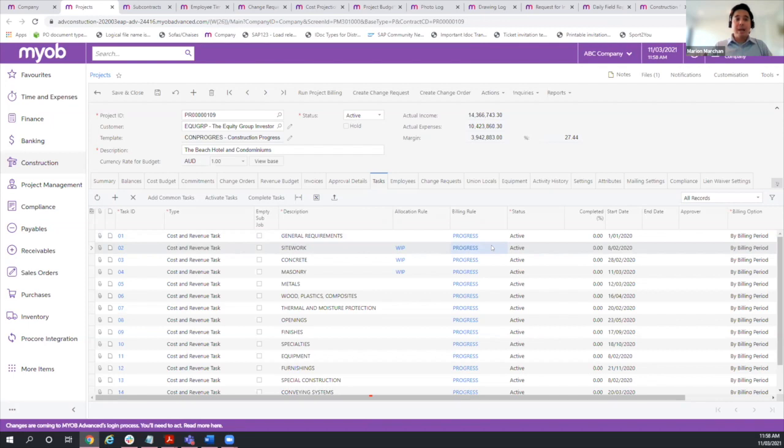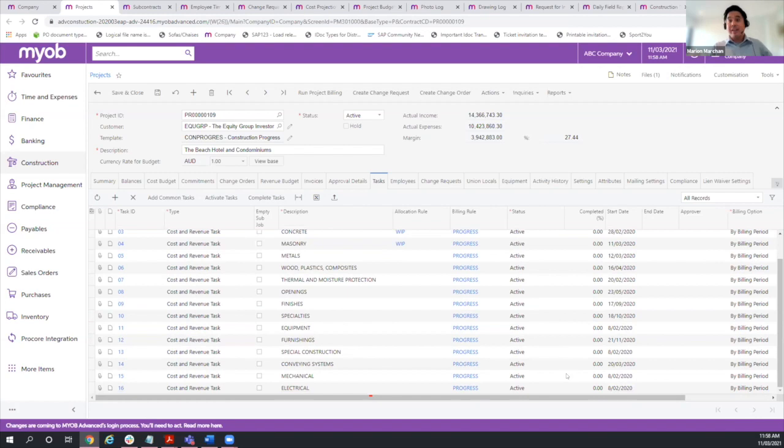One practical application of that is, I know usually when you're building a house, you have your progress billing while you're building the structure itself. But for the finishing, like the interiors and things like that, where customers have lots of choices in terms of how they want to finish the house, that usually becomes a cost plus engagement, where you charge a fixed fee on top of what the material costs are. So you can have that as a separate line on here, and all of your billing will be automated based on what the costs of the actual purchases are.